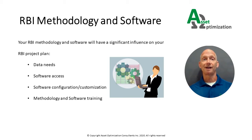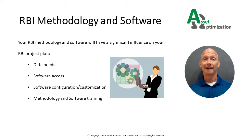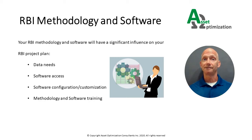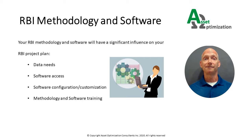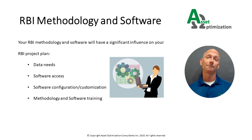You need to ensure that the software you have selected for your RBI implementation is ready to use when you start your project, and that your RBI team members have the appropriate access to it. Organizations and facilities have unique work processes and ways of organizing and classifying their equipment, which sometimes requires configuration and customization of the RBI software. This takes time, so you want to ensure that you allow time for these activities prior to your implementation effort.